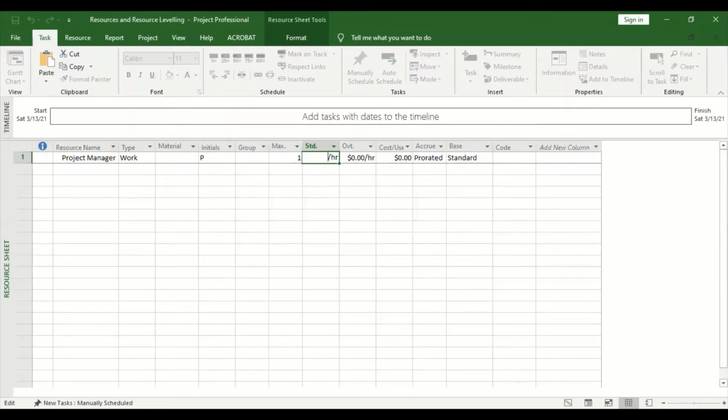In case you're paying them by the month, then you can calculate accordingly. For example, every month you're working 20 days a month, and each day you're working 8 hours. That means that person is working 8 times 20, that is 160 hours. So you can get their total monthly salary and divide by 160, then you come up with a rate.